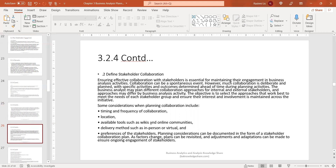The second element within the stakeholder analysis is defining stakeholder collaboration. You want to identify things that would impact collaboration — a good example is going remote during COVID. In that case, you need to understand the best approach to gather requirements if you are offshore, how to adjust timing, how to set expectations with stakeholders up front, and what preferences stakeholders have for elicitation sessions and requirements efforts.